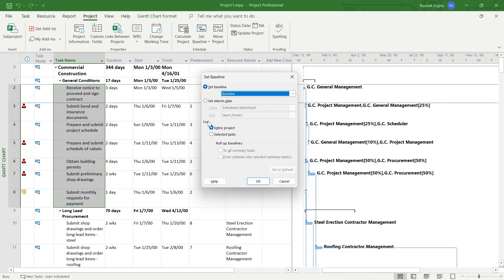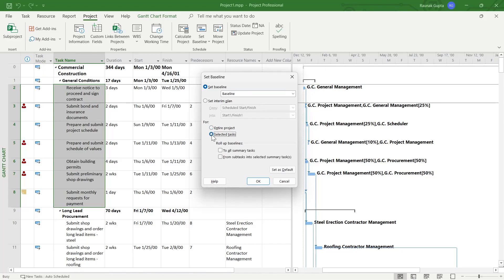And now in the for section, we have entire project or selected task. So if you would have selected some tasks right here, you can click on the second option that is selected tasks and here you have roll up baselines options. So the first option is to all summary tasks and the second option is from subtasks into selected summary tasks.